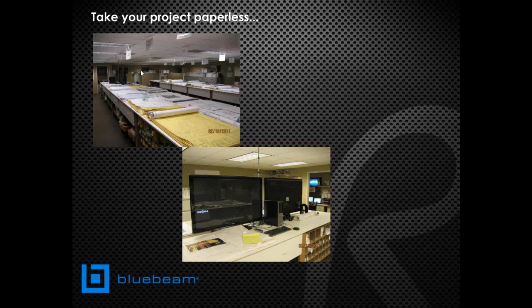Walk around this table over here, all the way back over there, grab the appropriate binder, bring it all the way back around here, and see what the RFI means to me. Hey, look, it's pointing me to a different sheet completely. I've got to walk back around to this sheet over here to get the information I need. We streamlined that by putting everything in a .pdf file format, hyperlinking our documents together, and posting things electronically. It really allowed us to go to a digital plan room with these 2 TVs here, with a local area network hosting all of our hyperlinked files together.